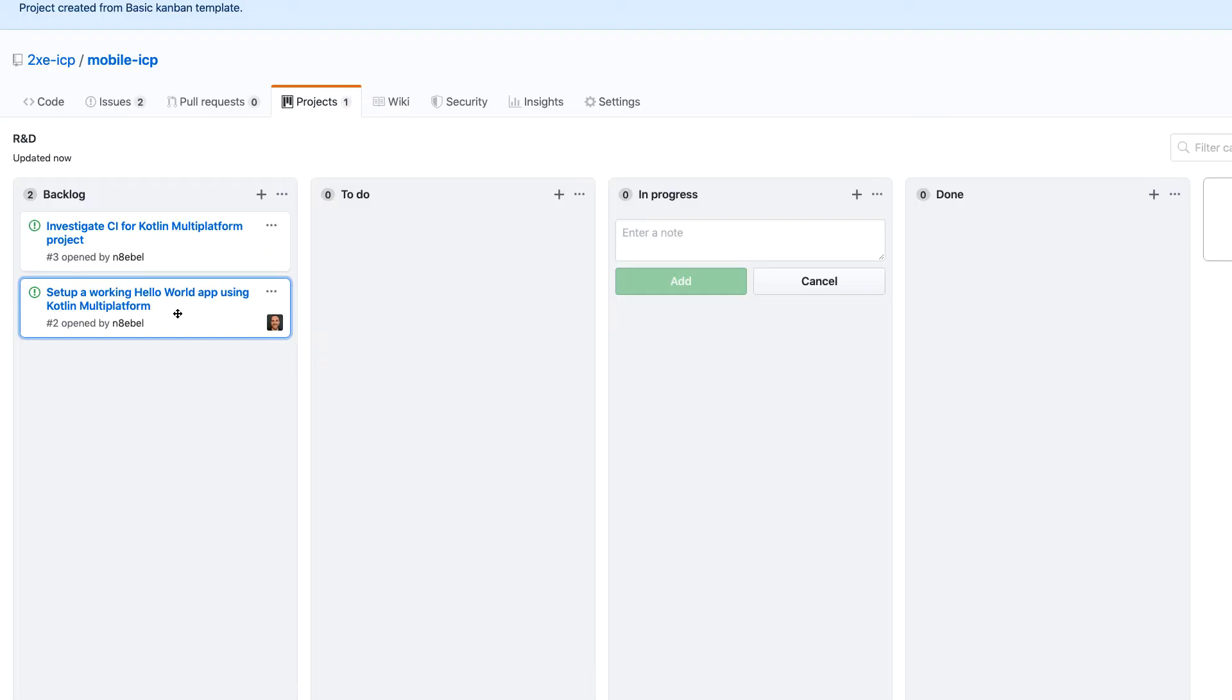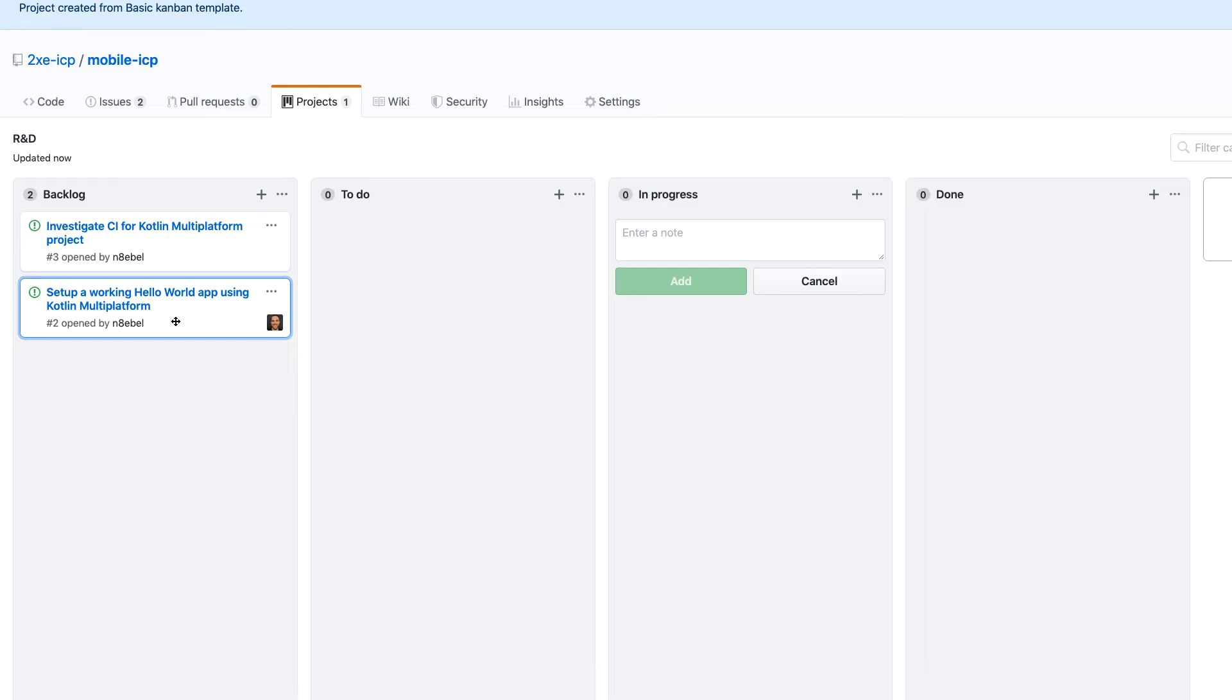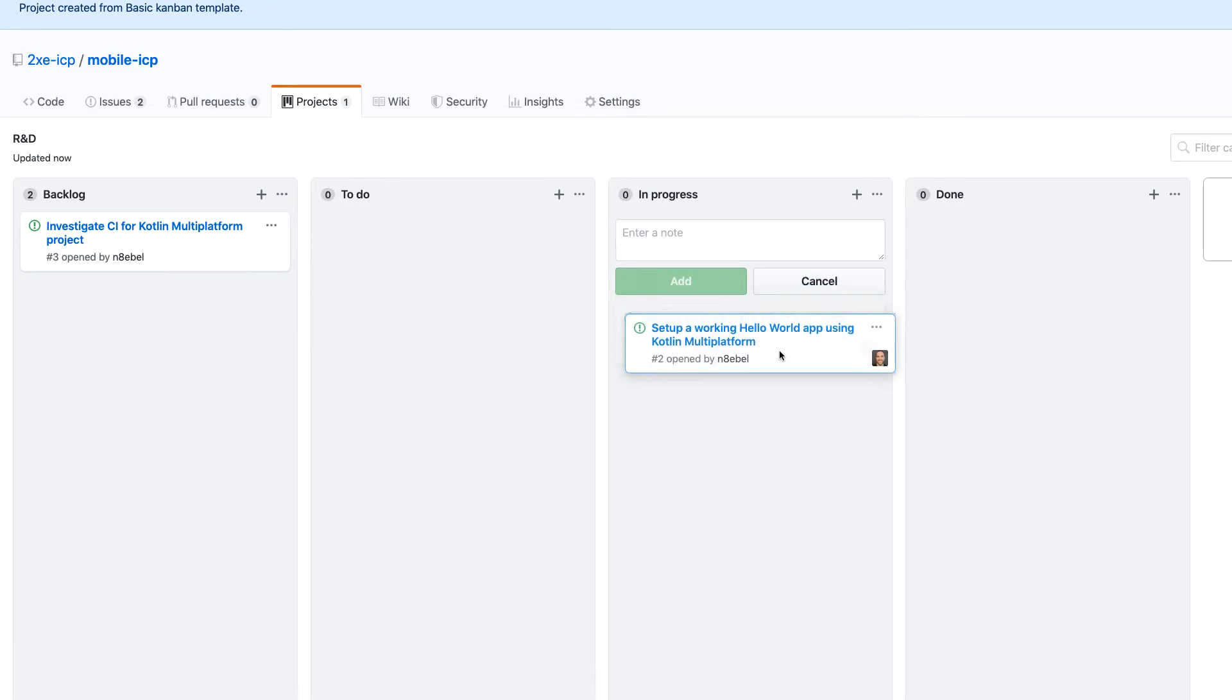So then again, I will move these over here. So now any brand new issue I create can end up in the backlog and then things I am currently working on could be moved to in progress. So for example, right now I am currently working on setting up a hello world project for Kotlin multi-platform mobile apps.